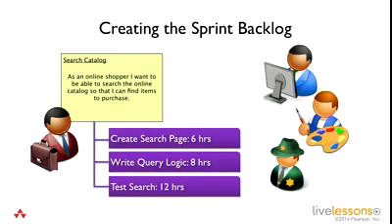These tasks should represent everything they need to do during the sprint to get this catalog item completely done. That would be all the development tasks, documentation tasks if that's part of what you need to get done, testing, all of those things need to be tasked out. And you're also going to task these out and estimate them in hours. We don't have to be super precise. In fact, sometimes we use buckets of 2, 4, 6, or 3 or 6, depending on the team, because when you say something like 1.5, you're giving it a little bit more accuracy than probably is there. It needs to be relatively close, but again, we're going to be monitoring this every day and find out if we're actually accurate or not.